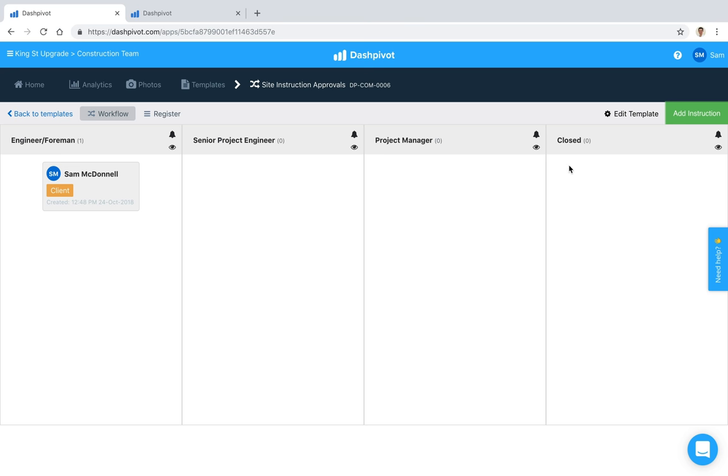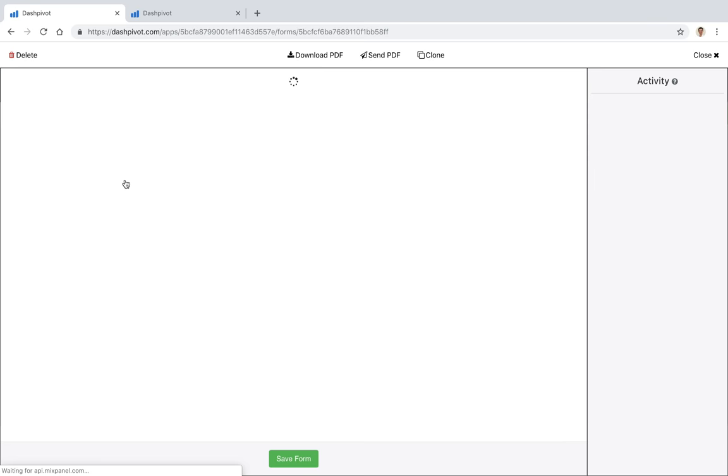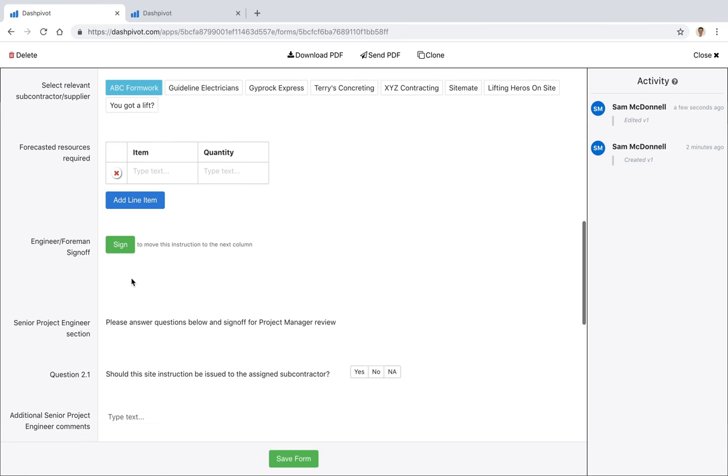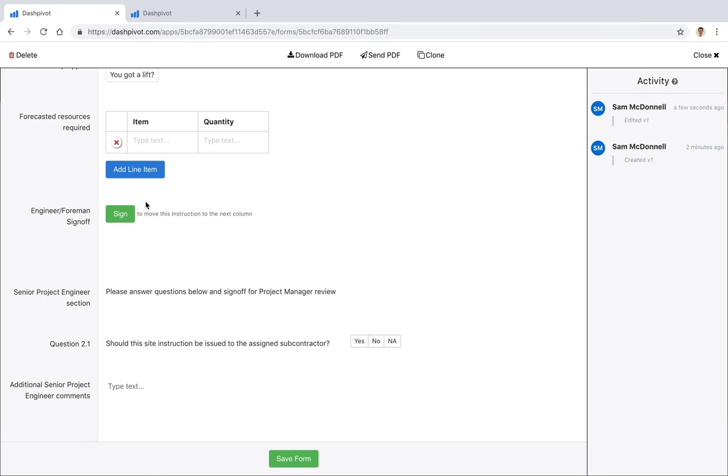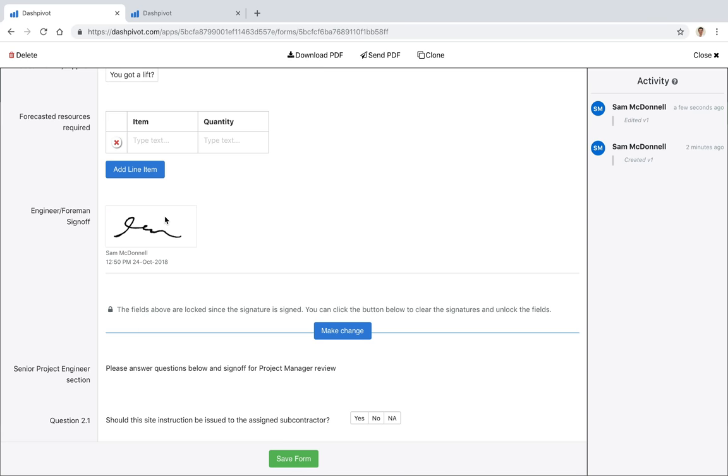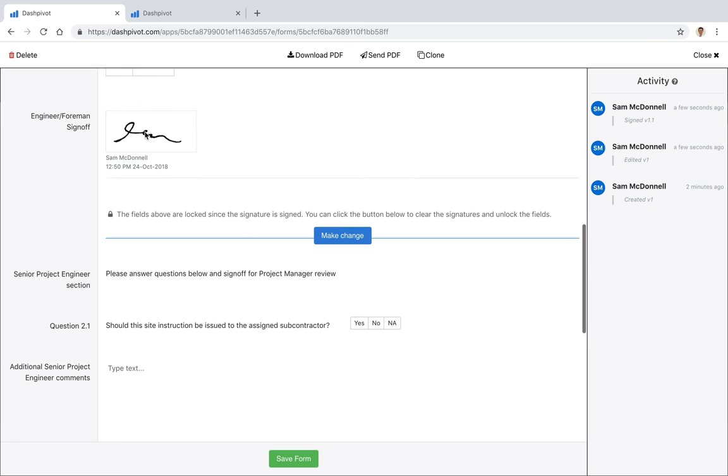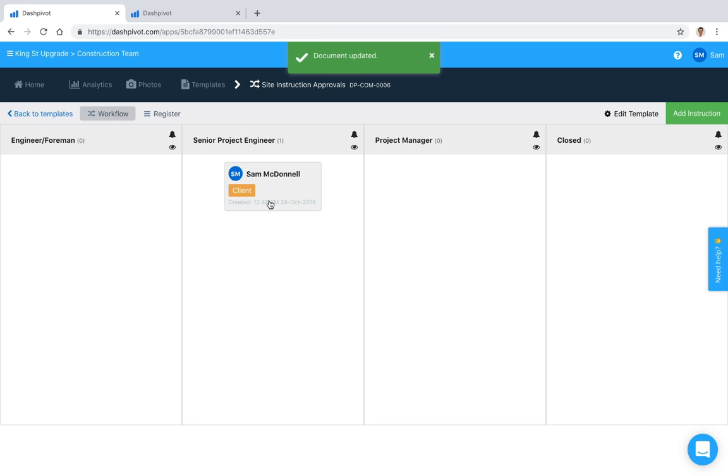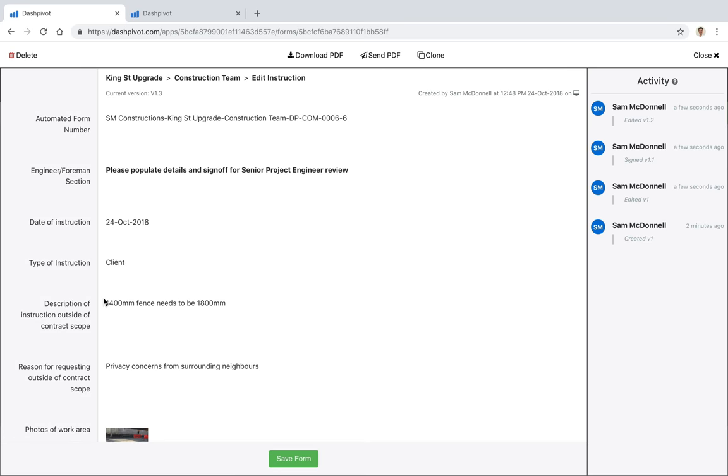The way that we do that is with what we call approval signatures. If I scroll down, we have this signature here that says engineer or foreman sign-off. The engineer or foreman needs to click sign here and stamp their signature with the time and date. Now if I save it, you'll see that it's moved to this next column.